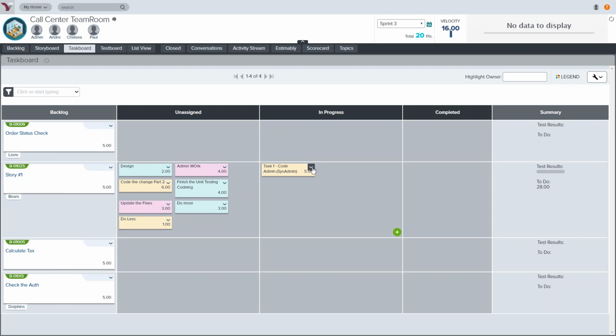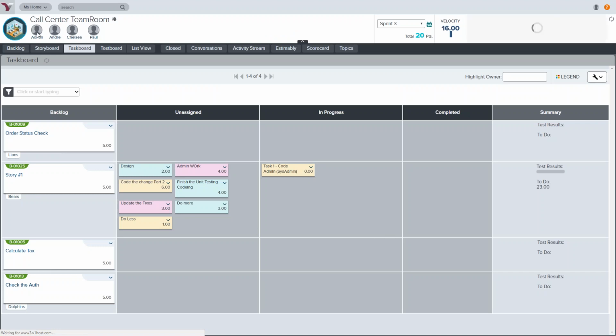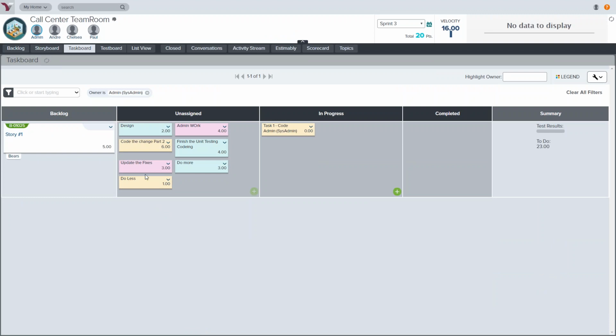When I'm done with that story, I'm going to go ahead and track it. So I'm going to track this down to 0 to-do hours. I put 5 hours on this already, and now I have 0 to do. So I'm going to go into my stand-up and say, hey, I finished all of my stuff. Maybe I'll even click on this, and it'll show me the work that I'm doing when I click on my icon. So I'm working on story 1, on task 1, and I've got it done. So I'll move it into completed. In that case, it's over here and completed.